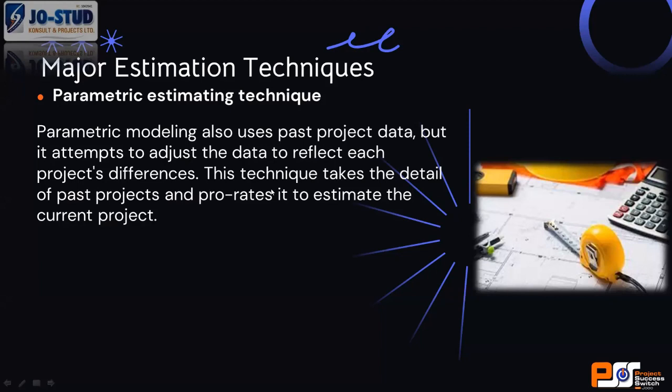If project managers do accurate documentation in whatever you are doing, even in the filmmaking of Mr. Josh, he can just document an average cost of shooting a scene in a movie. He can have it in his archive. When somebody wants him to do a job, all he needs to quickly give the person a rough estimate is to say, okay, if your movie is 200 scenes, average cost per scene is maybe 10,000 naira. You can just multiply 10,000 by the number of scenes. So most times parametric estimate comes in handy.